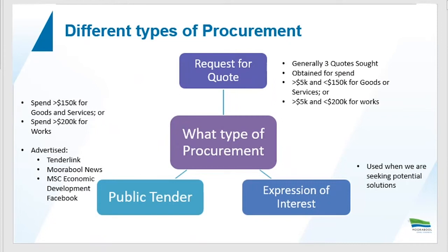Outside of the 2 main structured procurement processes, we also have the opportunity for expression of interest, which is when we're trying to understand the best solution for a procurement process that we're undertaking. And an expression of interest can then obviously lead into other procurement processes, whether it be a request for quote or a public tender process.